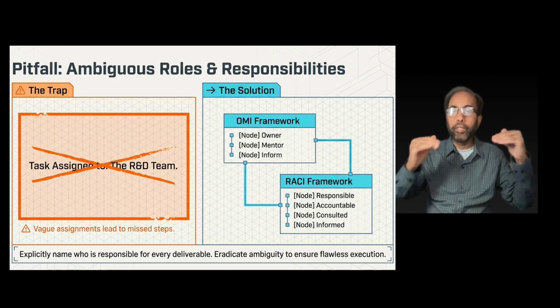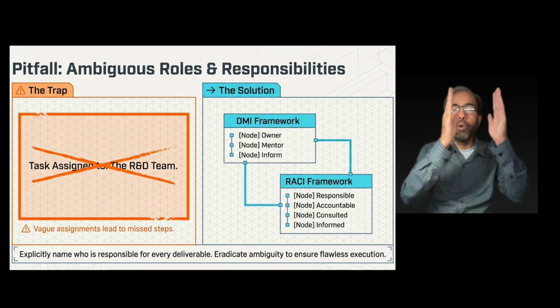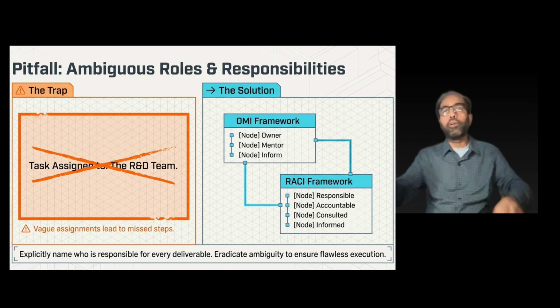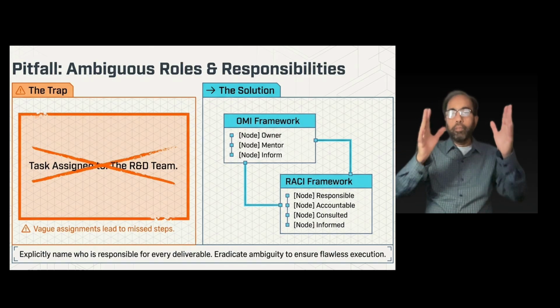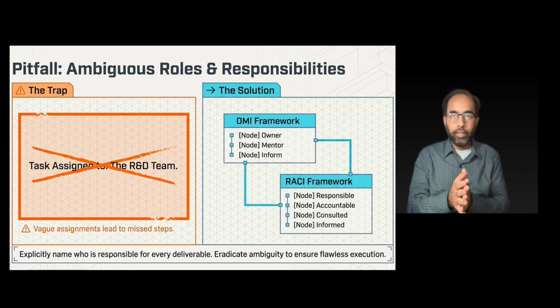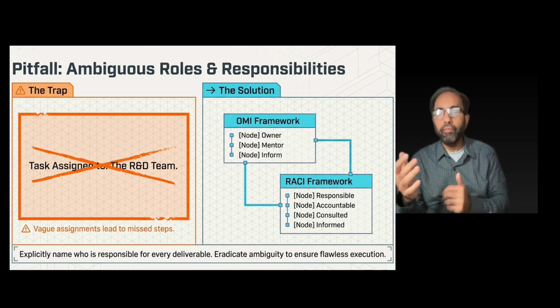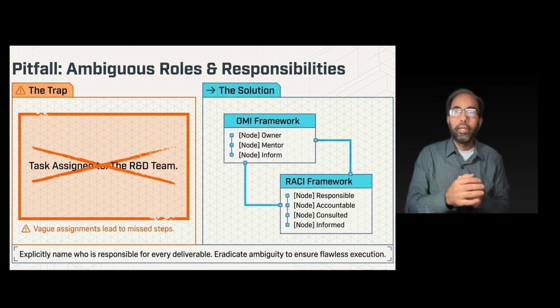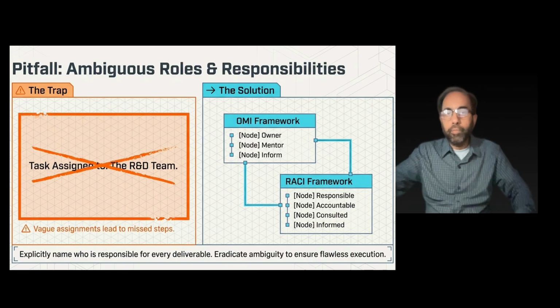Yes, you can assign it to a number of people, but there has to be an owner. I use a method called OMI. The owner is the person who is responsible for the task. And M could be the mentor, the advisor, a consultant. And the person who should be informed is the third person.